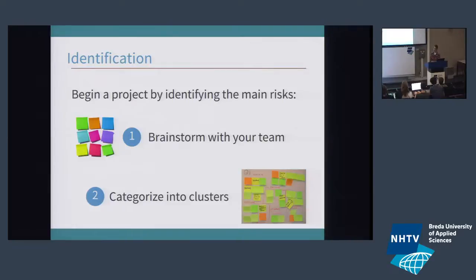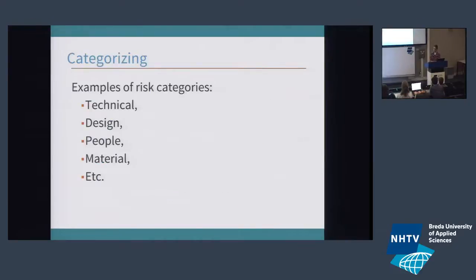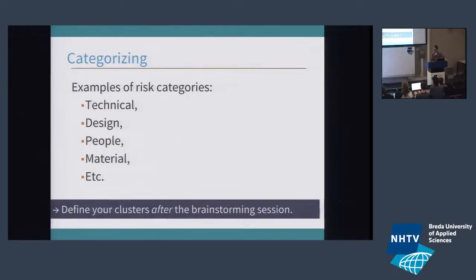You categorize these into clusters — categories of risks, which could be technical, design, people, resources, or more specific ones like progression design or core mechanics. It's important that you define these clusters afterwards. If you define the clusters first, you're going to be looking for answers in specific categories. You want to do a free brainstorm first and then cluster them into categories.